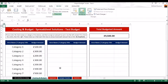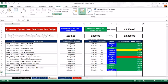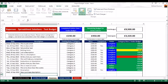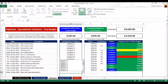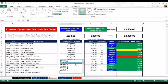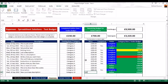Once you've determined your budget, click on expenses. You essentially capture each one: for example, on the 16th of September you make a purchase, you add a purchase description — anything to remind you what you bought — then you click the drop-down list which gives you your categories. Categories already completed won't appear. Let's say I select category 13: it tells me it's still active and I've got 250 pounds left to spend. I make a purchase of 225 pounds and I can see I've got 25 pounds left in that category.